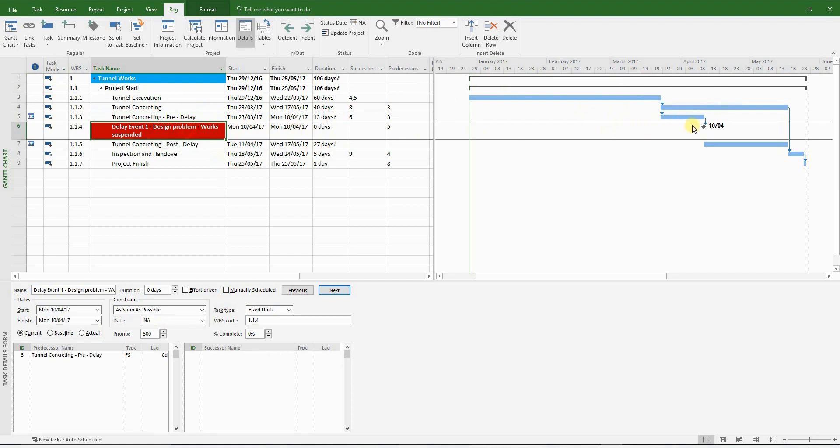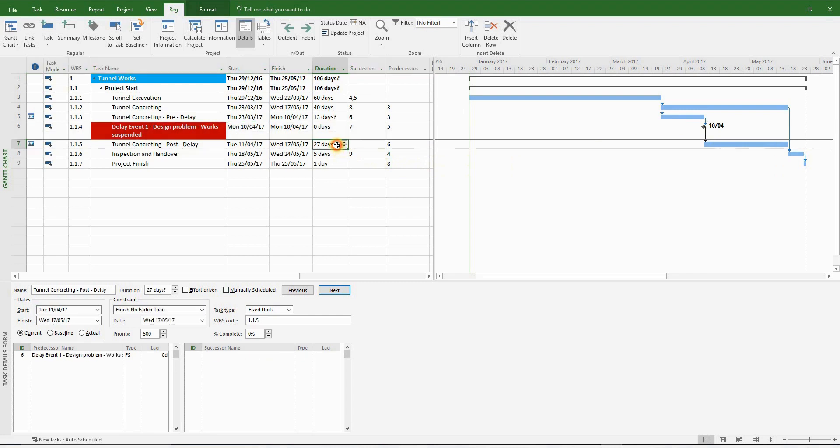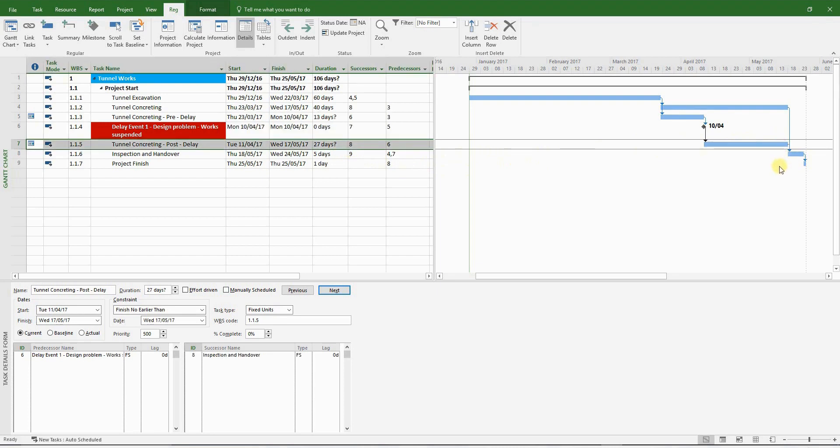Next, let's put a finish to start link from the delay event to the tunnel concreting post-delay. And finally, we'll insert another finish to start link from the tunnel concreting post-delay activity to the inspection and handover. So now the whole network is logically linked.